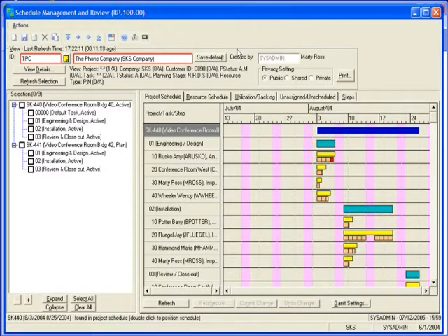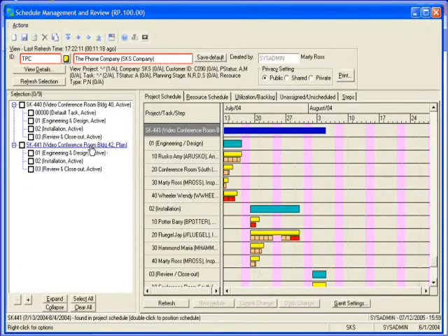Well, that's some really cool stuff. I see in the selection frame on the left that SK441, our new one, status is plan. I know you explained to me that we set the project to plan so that no one would record any actual costs against it until we're ready to do so. Right. But once we're ready to start work on it, I know we're going to want to activate the project, so we'll just go into project maintenance and change the status. Is that right, or is there another way to do it?